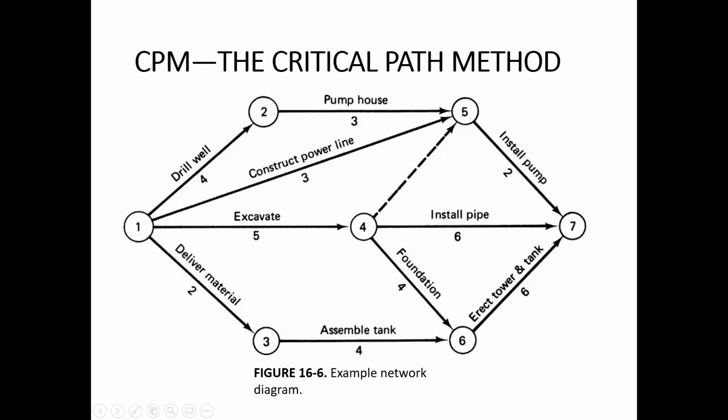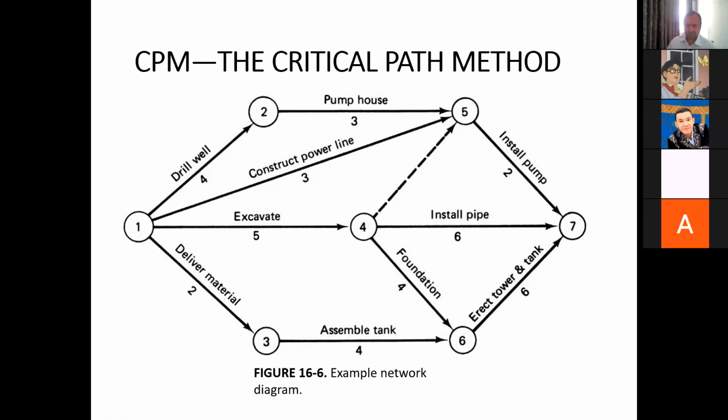Can you tell me, install pump has how many activities which precede? 3 activities actually. Yes, you are saying 3 activities. It's going to start after pump house, drilling well, construct power line. I'm talking about the immediately preceding activities. Immediately, just pump house and construct power line. But generally speaking, it should start after 3 activities.